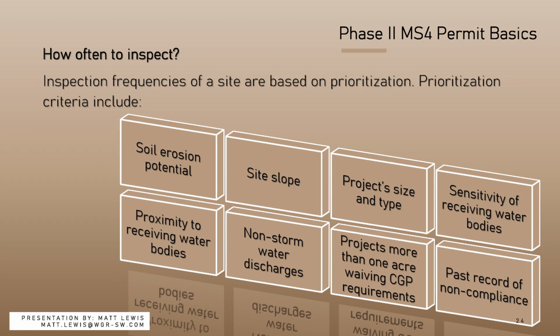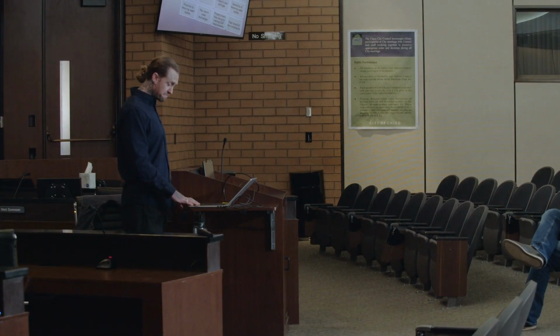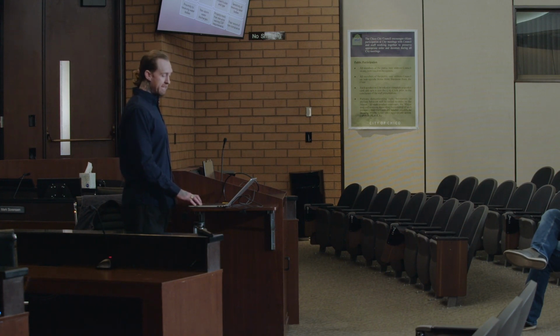And as I said, at minimum, inspections are required prior to land disturbance, especially during the rainy season, during active construction, and following active construction or post-construction.